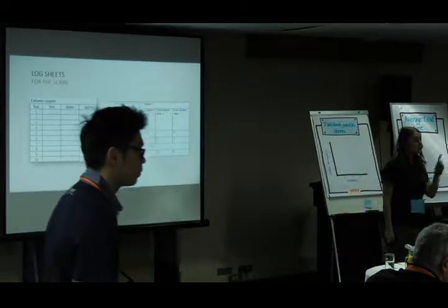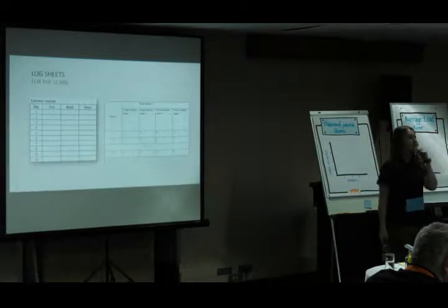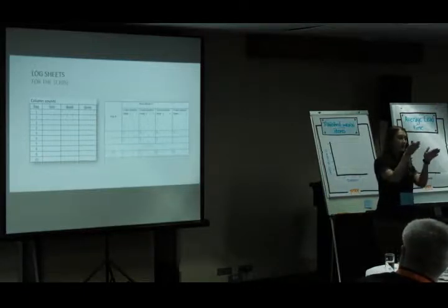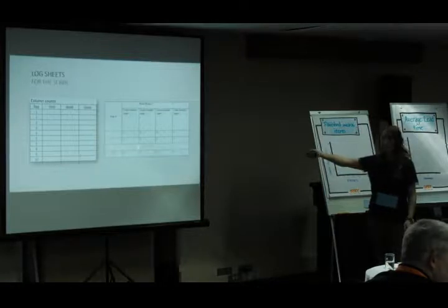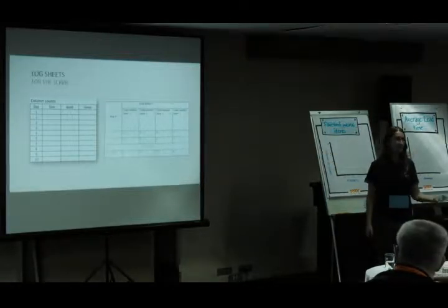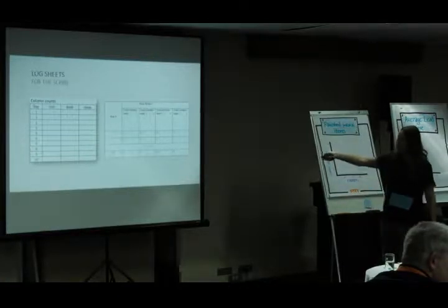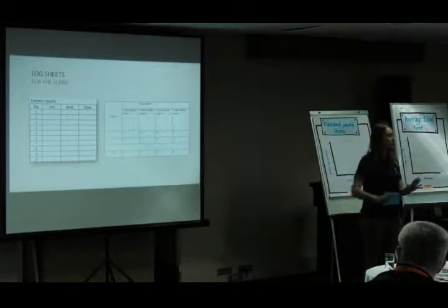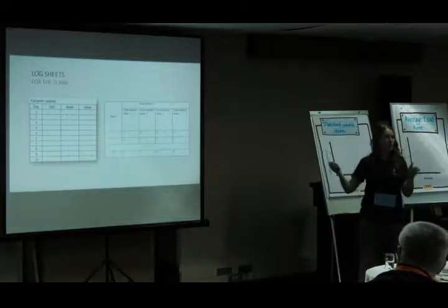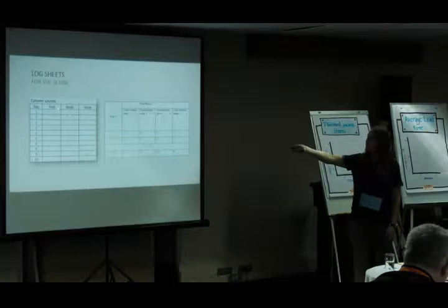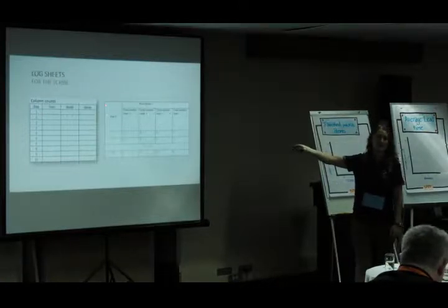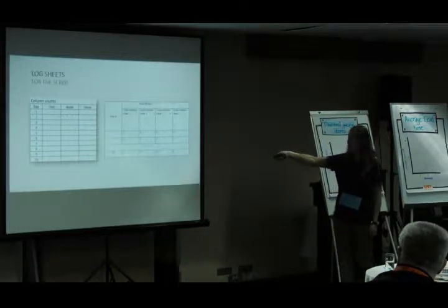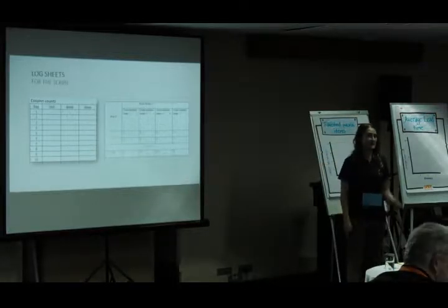You're going to take note of what the team members have tossed. Remember, when the daily stand-up starts, everyone will flick their coins together. You're going to jot down if they've tossed blue or red: B for blue, R for red. This scribe column count will happen at the end of every day, after all the moves have been made. You'll say how many for day 1 are in test, how many for day 1 are in build, how many for day 1 are in done. You'll also be able to track from the left corners what day you are on. Everyone happy so far with this?